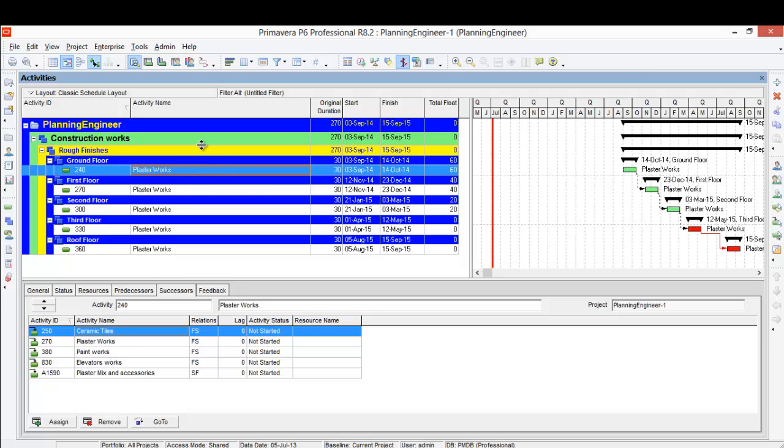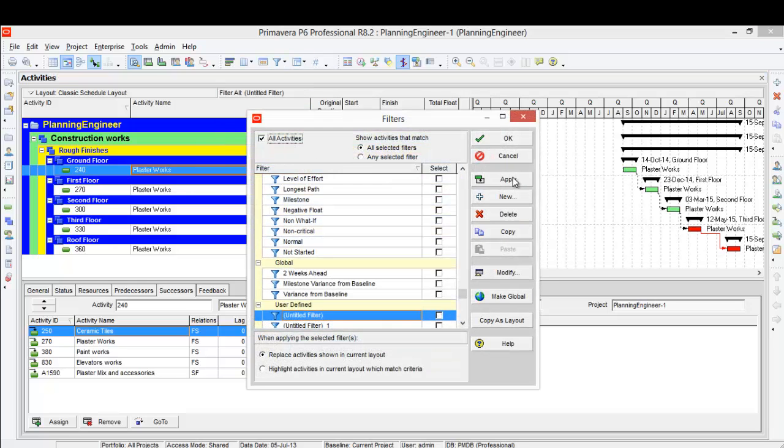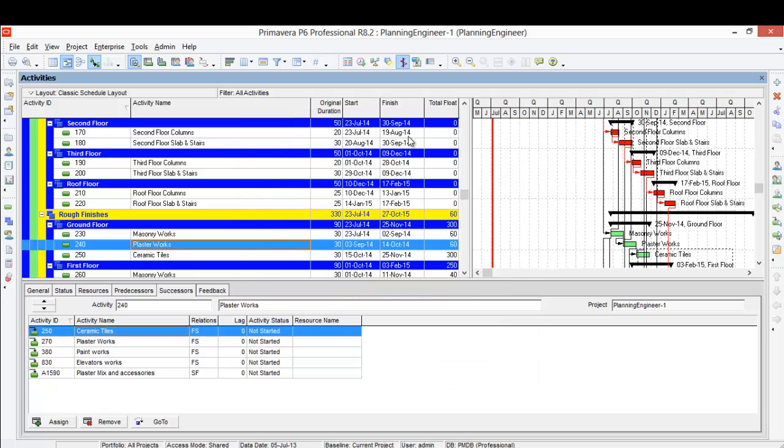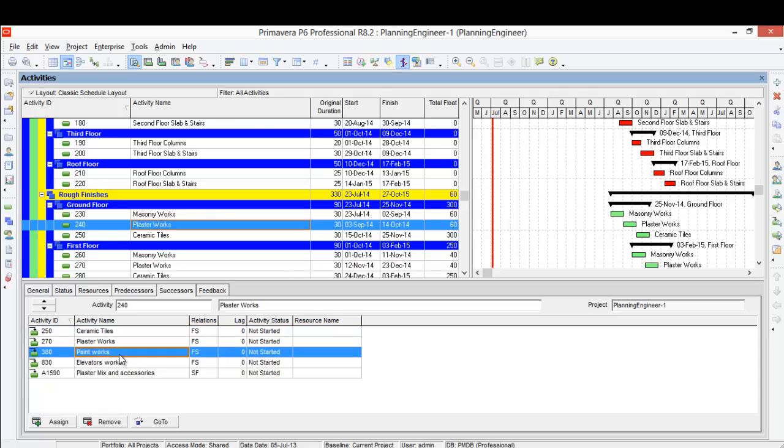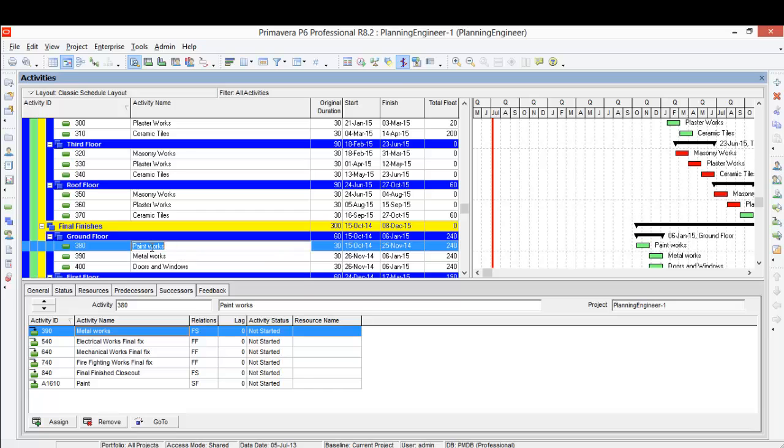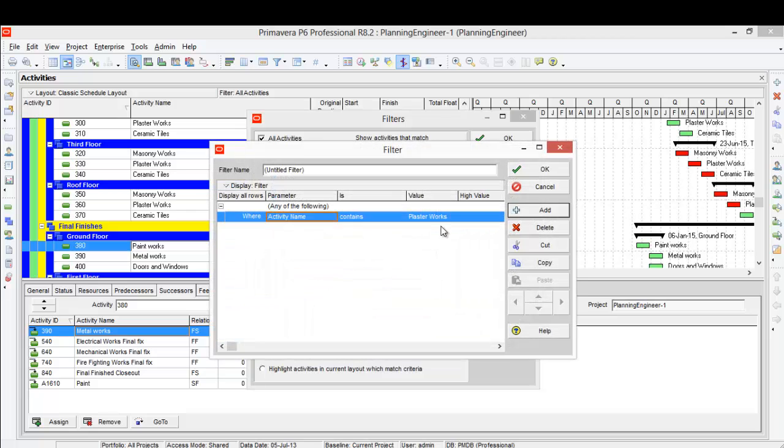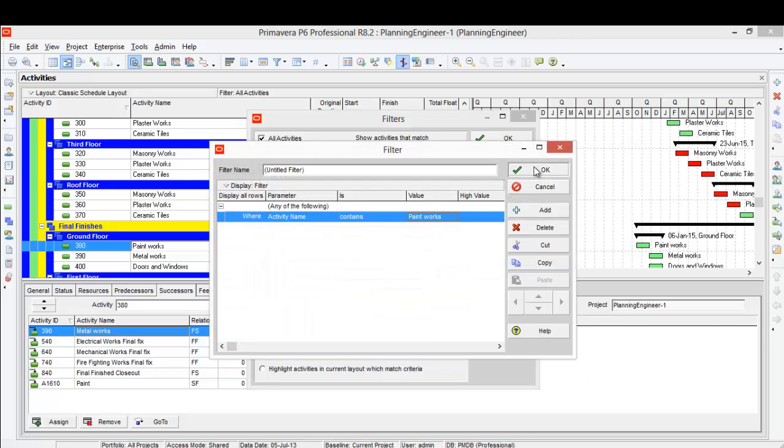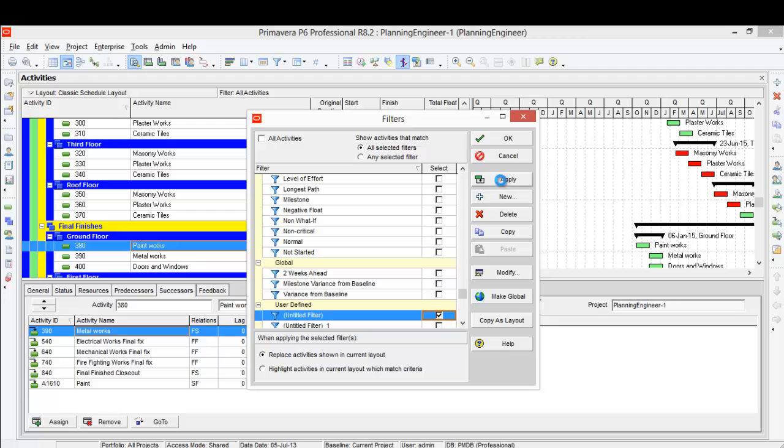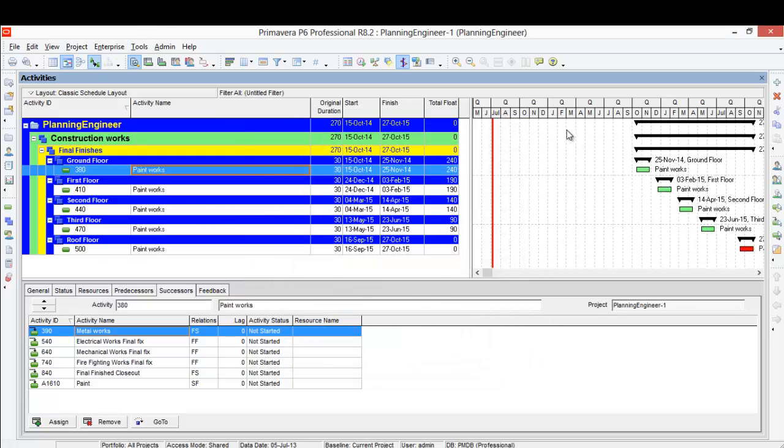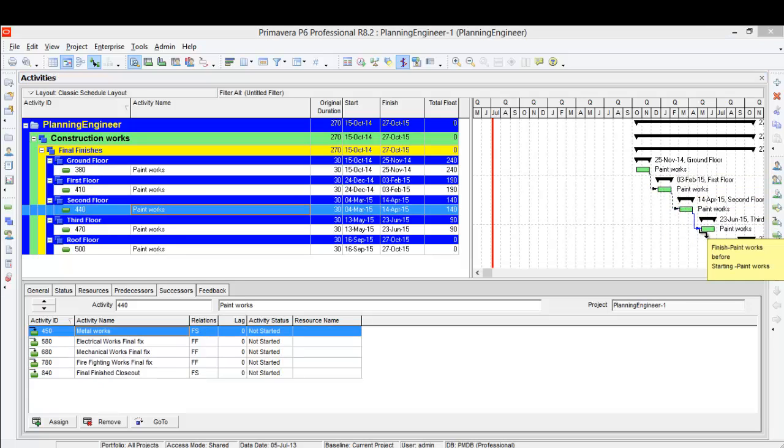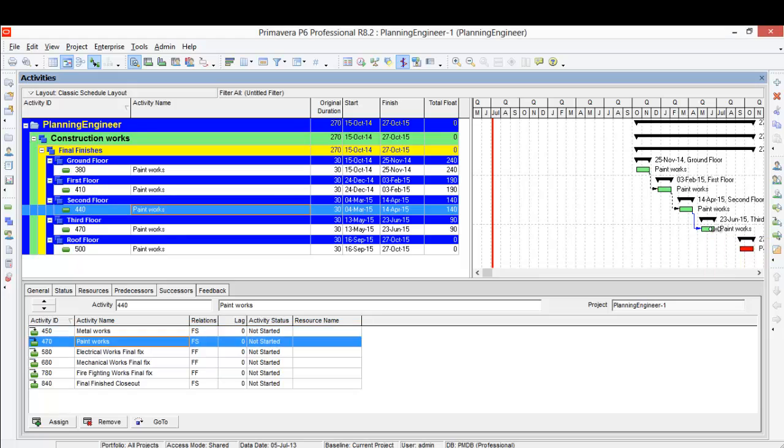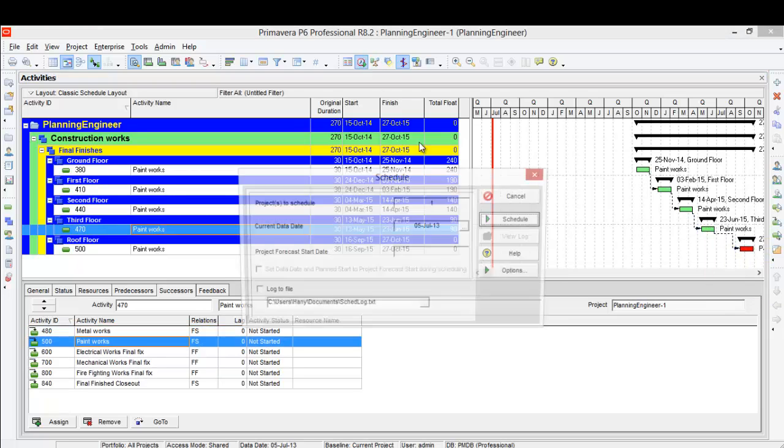Now I will remove my filter. Okay, another way to reduce the total float - this plaster work depends on the painting work. So I'll go to the painting work. Painting work here has big float. So I'll copy the painting work and I will do the same what I did in the plaster work. And make it finish to start here, finish to start here, finish to start here, finish to start, and finish to start. And let's run our schedule.